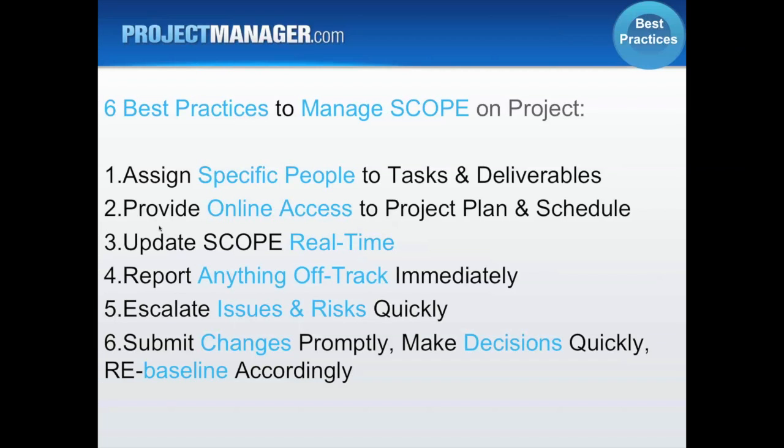And then important to not only your team, like you as a project manager, your team, your change control board, your customers, submitting changes promptly, making decisions quickly, and rebaselining accordingly. Rebaselining is one of the huge things for your scope. Is once your change control board does evaluate and approve something, or if they're including new scope or things change, that's your opportunity as the project manager to rebaseline your plans.